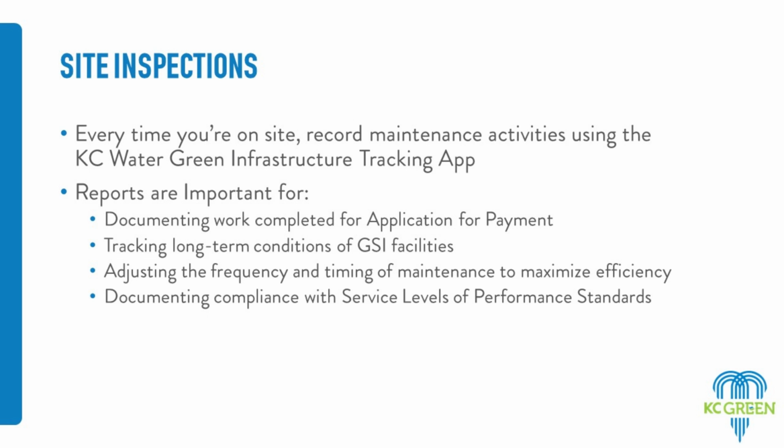All right, so the app is Field Maps, and we'll talk a little bit about that on the next slide. But every single time you visit a site, we need all of the activities recorded through this app. So that's not just taking pictures on your phone. The pictures need to be through the Field Maps app. And like Lauren said, it documents your work completed. It also tracks long-term conditions. So if you're seeing a problem every time you're out on site and you're documenting that, that helps us know what we need to do on our end to help address those issues that you're seeing. It also will help you adjust the frequency of the maintenance.